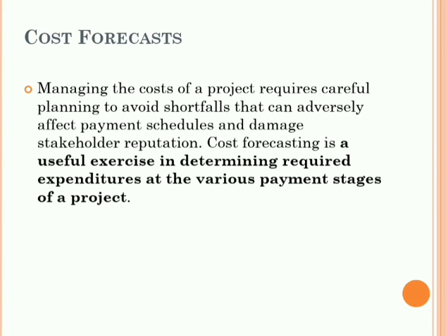For example, a contractor hires 10 cranes, costing a total of 1 lakh per month from a third party with a 60 days payment term. At the end of 1 month, the contractor will book 1 lakh in its books as actual cost.